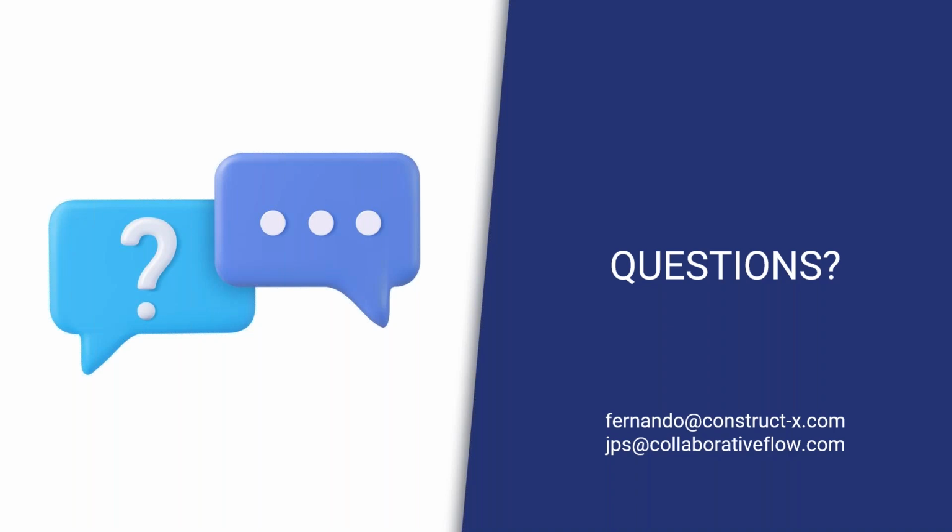Yeah. And again, we're not getting too detailed at this early stage. We're trying to look at the fundamental relationships and the fundamental scopes of an IWP, and a sequence of IWPs, not necessarily all the content and everything else, because most people know how to build, and they'll know what to integrate. The details need to be pushed downstream to when the people that are actually going to build can make better decisions, but hopefully aligned.